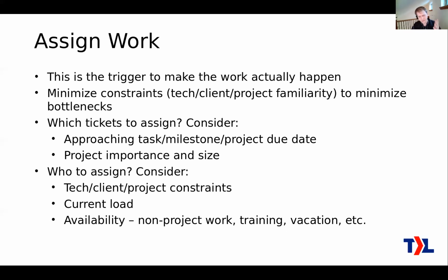So who do you assign? Well, like I mentioned, constraints in terms of who is able to take that ticket based on the technology and experience, the client and project familiarity, and the current load. So, if you're looking at your busiest technician, try not to give them more work, try to give somebody else more work. And you even need to consider the availability. So things like non-project work, or maybe you don't have a dedicated project team. Maybe they're doing service work too. So consider that. Training sessions coming up, vacations, and so on. You need to consider.